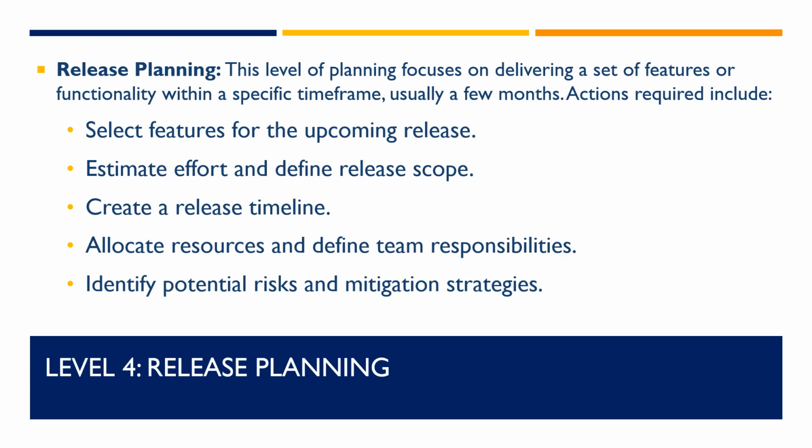The next level is release planning. This level of planning focuses on delivering a set of features or functionality within a specific timeframe, usually a few months. Actions required at this level include selecting features for the upcoming release, estimating effort and defining release scope, creating a release timeline, allocating resources and defining team responsibilities, and identifying potential risks and mitigation strategies.